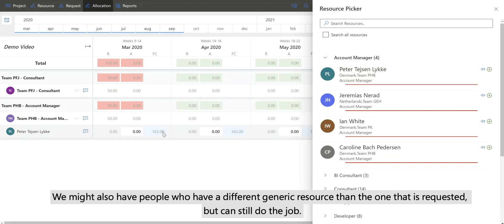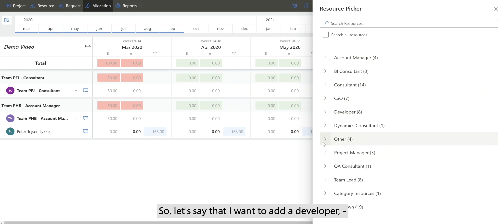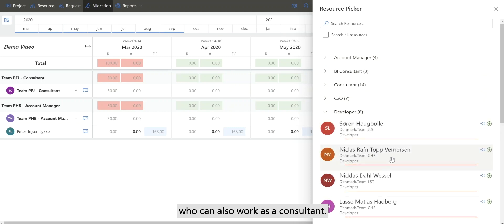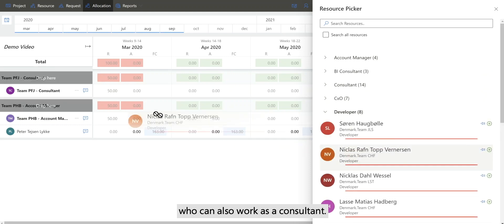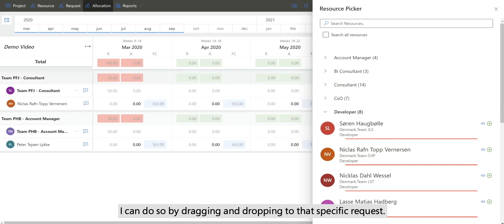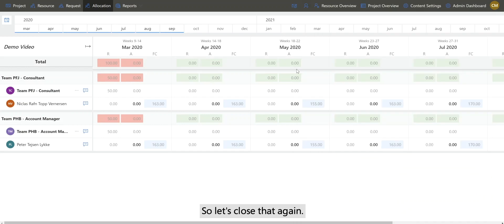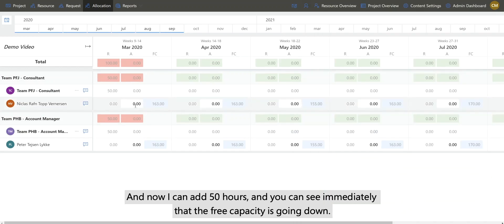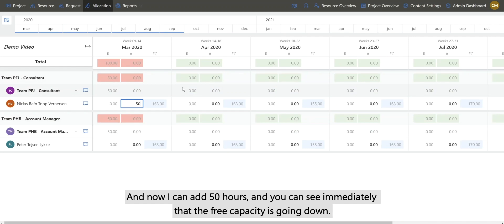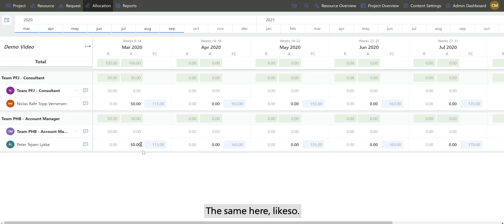You might also have people who have a different generic resource than the one that I requested but can still do the job. So let's say that I want to add a developer who can also work as a consultant. I can do so by dragging and dropping to that specific request. Now I can add 50 hours, and you can see immediately that the free capacity is going down.